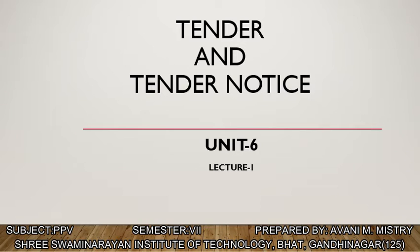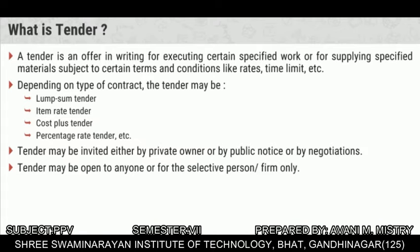Tender and Tender Notice, Unit Number 6, Lecture Number 1. A tender is a written notice for executing certain specified work or supplying specified materials, subject to certain terms and conditions like rates and time limits. Depending upon the type of contract, tender may be a lump sum tender, item rate tender, cost plus tender, or percentage rate tender.